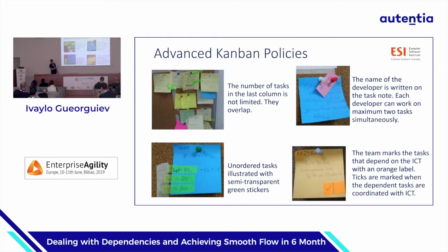These are the blockers. Okay, we are working on this, but we need the BA. Actually, we discussed that it's not good to return to the BA column. They put a blocker BA or mark it that it needs more BA here. And this is the policy that at the end, in the last column, you can put one over the other. So step by step, the Kanban team resolves the problems one by one, depending on how important they are for the team.